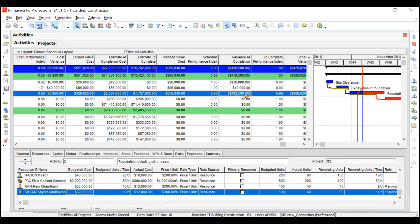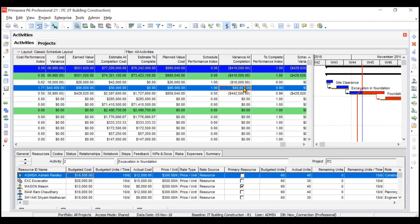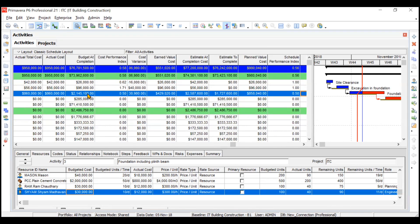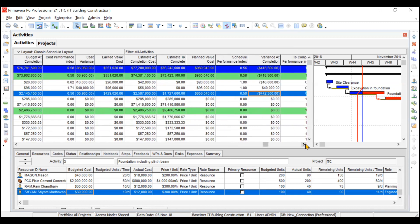Variance at Completion shows how much cost will be overspent or underspent on completing the activity. The formula is: Budgeted Cost minus Estimate at Completion. A negative value means you have overspent relative to your budget. For the second activity, which completed in four days versus a budgeted six days, the variance is positive — you saved cost. For the third activity, budgeted cost is 21,45,000 but EAC is 25,87,000, so it will exceed budget and the variance is negative.